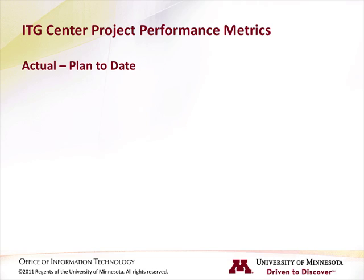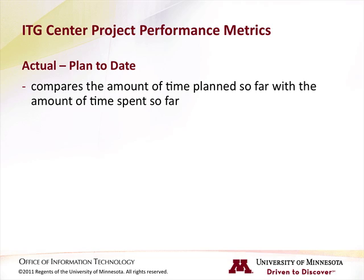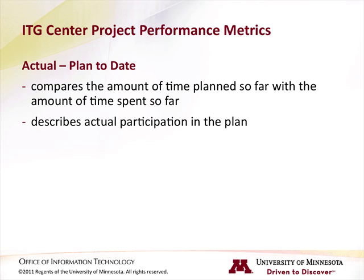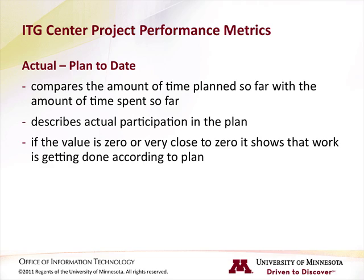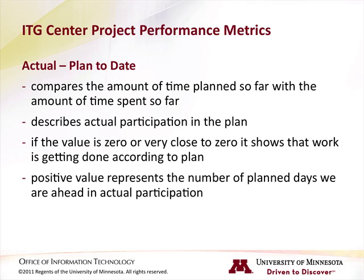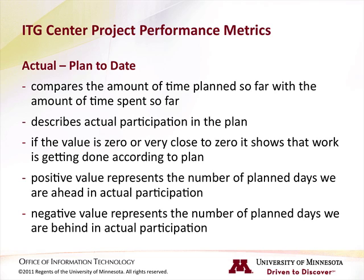Actuals minus plan to date compares the amount of time planned so far with the amount of time spent so far. It describes actual participation in the plan — it's not measuring what we're accomplishing for the work we're doing, but whether we've spent the planned number of days on an activity. If the value is 0 or very close to 0, it shows that the work is getting done according to the plan. A positive value represents the number of planned days we are ahead, and a negative value represents the number of planned days we are behind in actual participation.